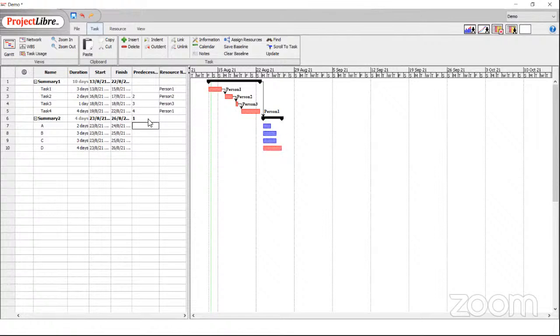Did you just see what happened? It moved the entire block of summary 2 to the endpoint. And you see how it is connecting up this arrow here. So this arrow is the end of summary 1 and connects to the beginning of summary two. For the purpose of understanding, summary two is regulatory submission and summary one is design dossier completion. Till design dossier is complete, we cannot start making regulatory submissions. So we link it like that as a dependency, and you have the whole thing jumping.